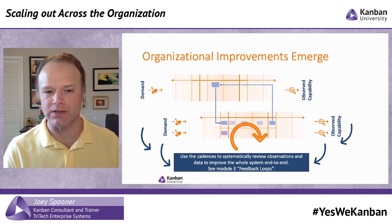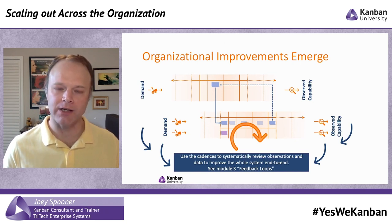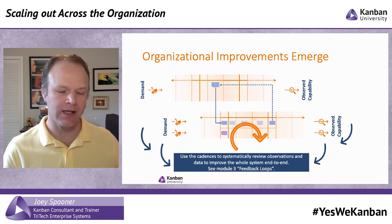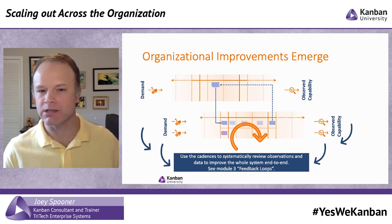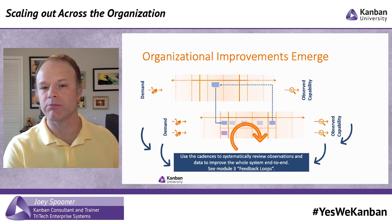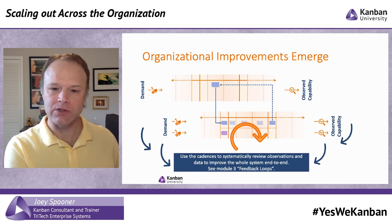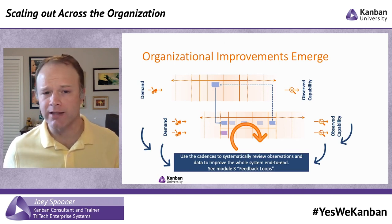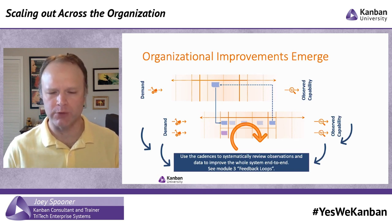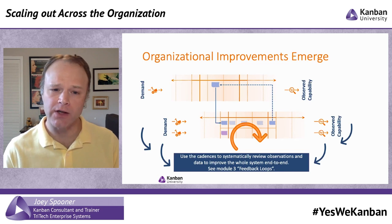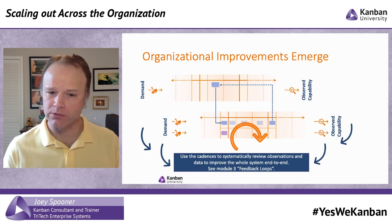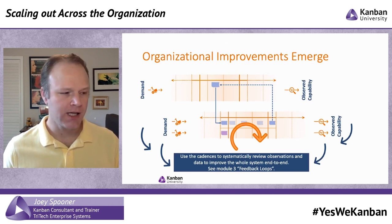When we're looking at scaling Kanban, you find that these conversations are superbly good. What happens is you build one system, you don't really have much of a conversation. You build another system, you start to have more of a conversation because now you have two to talk about. As you build out more and more systems or an entire service, there's a lot to talk about in a way that's a common language. It's an effect that happens when you use Kanban. We start talking about lead time, throughput, blockers, frequency of blockers — those are the risks versus the flow of the system. And that becomes the lingua franca of the environment.